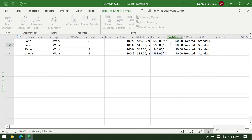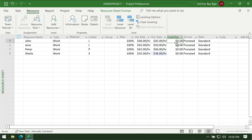The next column is cost per use. This is sort of like the flag-down rate of that person, if they have any. Some workers have a payment that you have to settle first before they start working for you — this goes for consultants or other similar jobs. Since these are all team members, let's say that they do not have any cost per use; they are already part of our team.